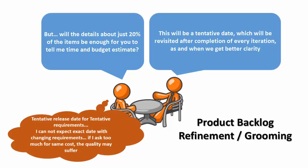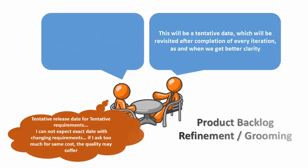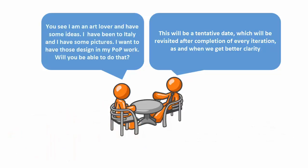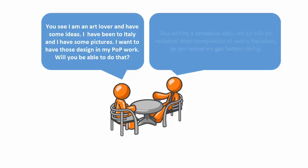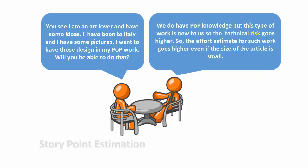Tentative release date for tentative requirements — I cannot expect an exact date with changing requirements. If I ask too much for the same cost, quality will suffer. I am an art lover and have some ideas — I've been to Italy and want those designs in my POP work. Will you be able to do that? We do have POP knowledge, but this type of work is new to us, so the technical risk goes higher and the effort estimate goes higher even if the size of the article is small.